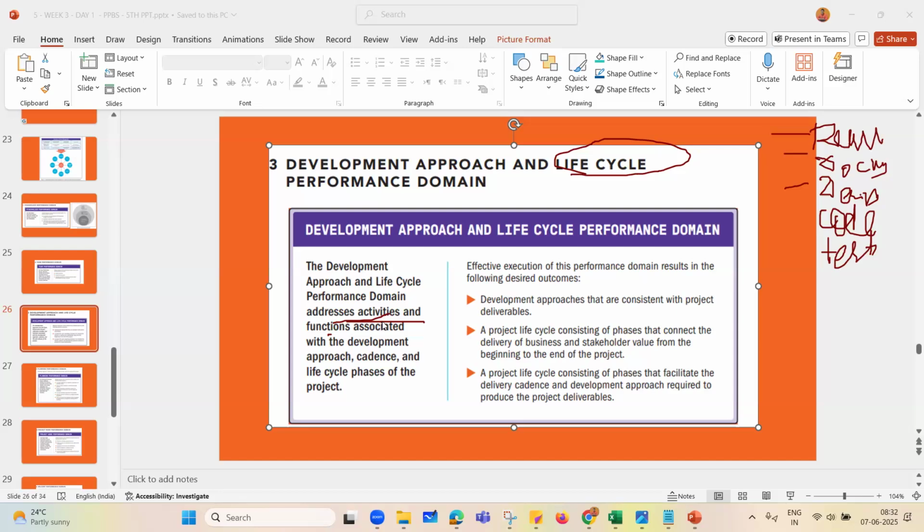And for every activity, when the requirement is bigger, the component it will build is at the granular level, it will be sliced. The requirement will be broken down into the thinnest requirement, which we may even call a user story, or we may call it a function. And we define how many functions we are going to deliver. And we define the approach, and also we define the cadence.